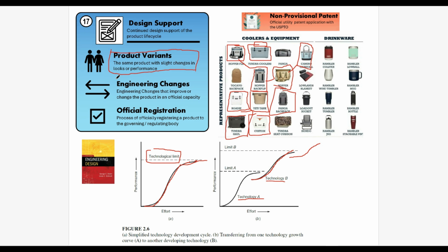And then engineering change notices. I'll probably make an entire video dedicated just to that. Engineering change notices are essentially finding mistakes in the official design documentation that you've created, and how to go about officially communicating these engineering changes to your vendors, potentially your customers, and how to manage these in inventory. So hopefully you never have to do these. If you've done due diligence, that won't happen. But sometimes mistakes seep through, and that's how we do an engineering change.